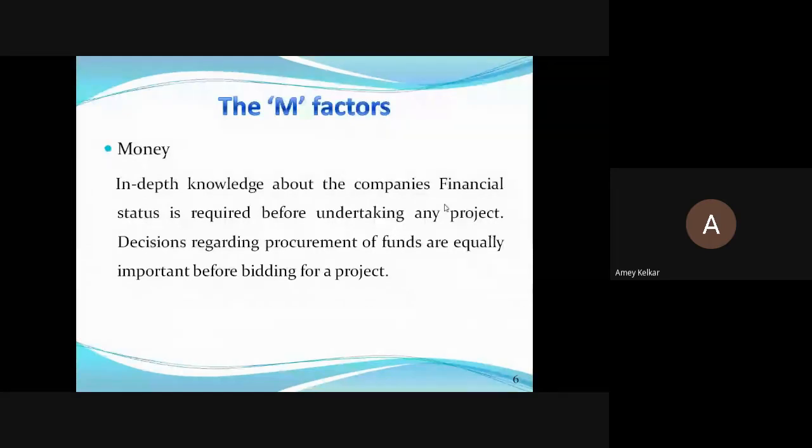So what I have mentioned here is that in-depth knowledge about the company's financial status is required before undertaking any project. Decisions regarding procurement of funds are equally important before bidding for a project. If you are bidding for a huge work and your company doesn't have that much finance, you should know the sources from where you can get the funds so that you can go ahead with the bidding for the project. You cannot manage money after you take the project. That is not accepted in project management. So you should have a clear-cut knowledge of the company finances.